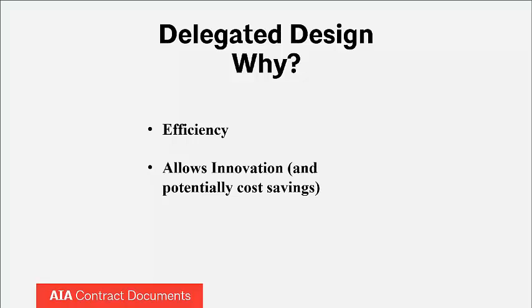It is just far more efficient for the design to be done in that way rather than to have the design team try and design truss members on each project. So the same thing can be true for fire protection systems, curtain wall systems, retaining walls, portions of mechanical systems, and a whole bunch of other components on a project. It's just quicker and cheaper to delegate the design of those items downstream to subcontractors and material suppliers.